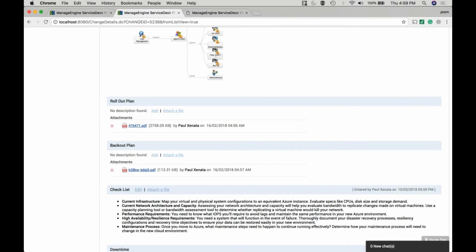All right. So once the impact is done, the next thing that I want to do with the analysis part is the rollout plan. How equipped am I to implement this change? What is the plan for implementation? What is the roadmap for implementation? How much time would I require? How many man hours do I require? Okay, do I have sufficient human resource to carry out this change activity? All this will be analyzed, and a rollout plan will be created and recorded in this section.